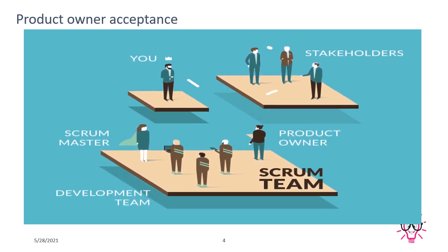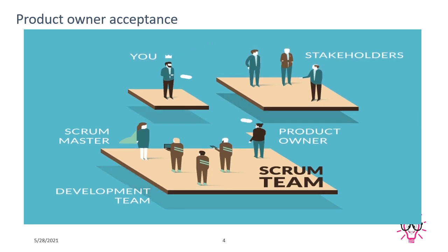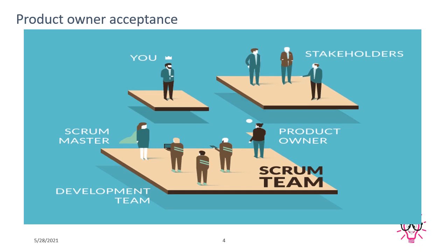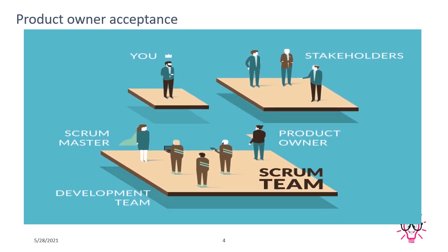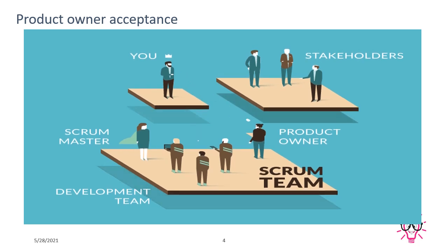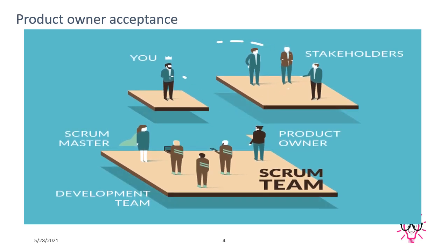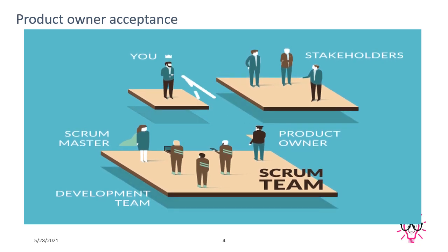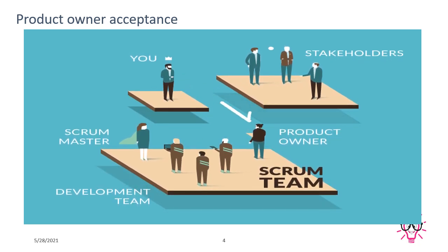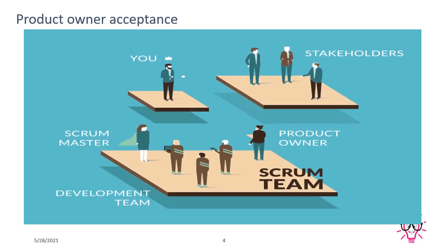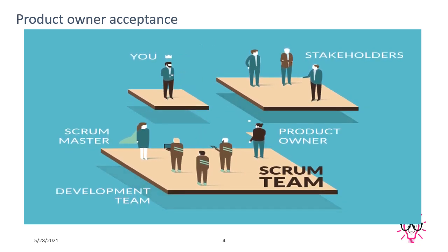Now, after verifying these things, once the product backlog has passed this test, the Scrum Master provides the entire product backlog list to the team members and asks them to go through the requirements which are on higher priority or urgent priority. Later on, if we have time, we will go with the other requirements also.